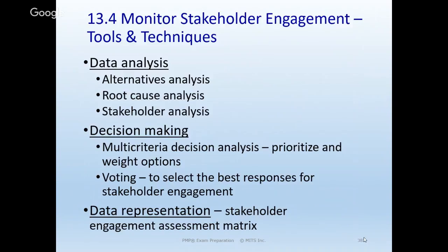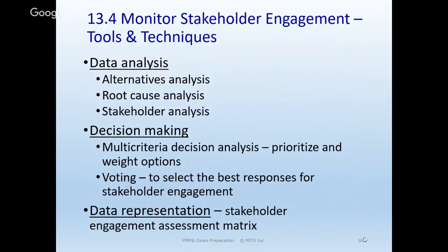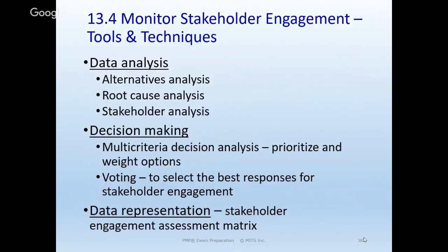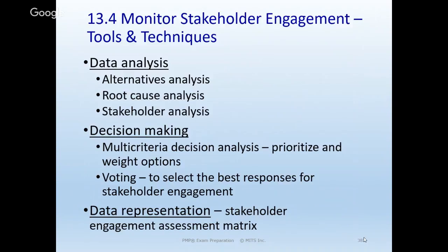There was one time when our PMO was put under another PMO that was more interested in headcount and not as much interested in how you're actually doing. So they weren't looking at plan versus actions. They wanted to get a good plan, but then they didn't compare that to what was actually produced or how many hours were actually worked. It took down some good reporting tools we had put together, pulling information out of various tools and putting together what we called the enterprise project management system, I think it was called.